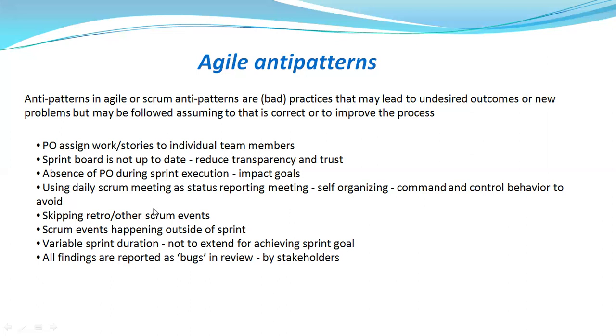And skipping the retro or other Scrum events. Yes, this is one common Agile anti-pattern. That means a few members will not attend the retrospective or other Scrum events. They may feel it is a waste of time. But each event has a specific reason to be happening and also a purpose. So if the team keeps doing this, then the Scrum Master is supposed to take the next required steps on how to handle the situation. Next, Scrum events happening outside of the sprint. Yes, this is also very commonly seen.